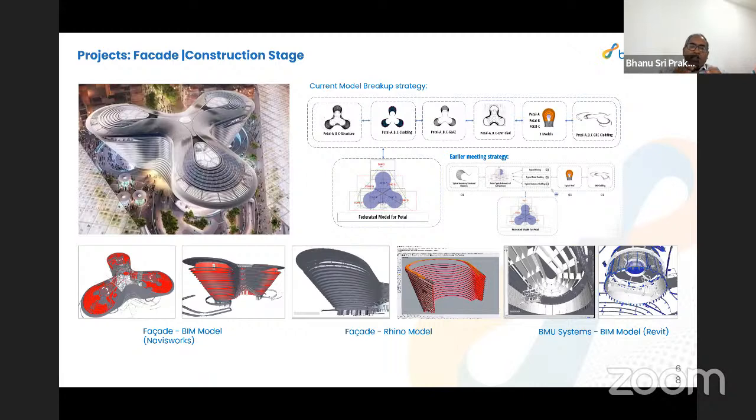After that, they took a digital 3D camera, because once you design and construct, you will have variation. So they literally did the entire 3D model from the scanning. We took that scanning model, imported it into our model, and then gave the setting out for the canopy based on the construction. So everything happened in a digital way. It was a phenomenal exercise.